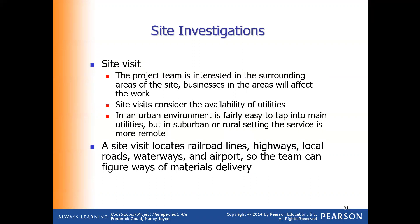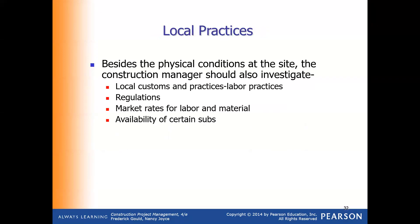We also need to look at highways, roads, waterways, and airports — those are all things that help us come up with a solid picture of the project. As far as local practices, sometimes we need to determine the current market at a particular project area to be able to create work packages according to the area and get local businesses involved, which helps promote the project for the company and could be one of the owner's requirements. Those are good pieces of information to look for.